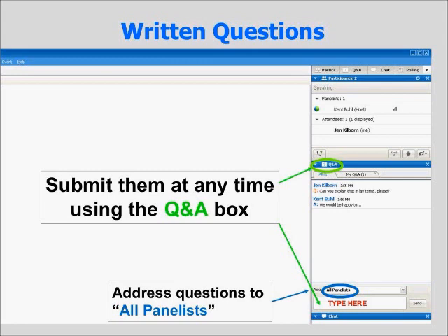Okay. When there is no longer any federal interest in any kind of non-environmental compliance issues, be they fiscal or what have you, then the further continuation of environmental compliance is not necessary unless there were mitigation measures that require continuous ongoing monitoring. For example, underground methane releases that need to be done regardless of 3 years after the project.